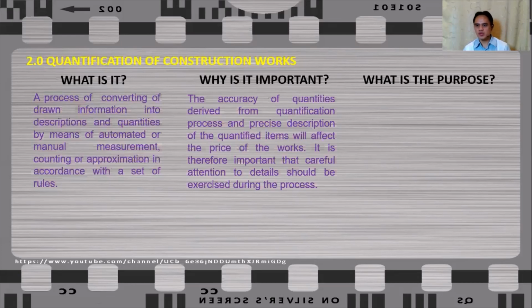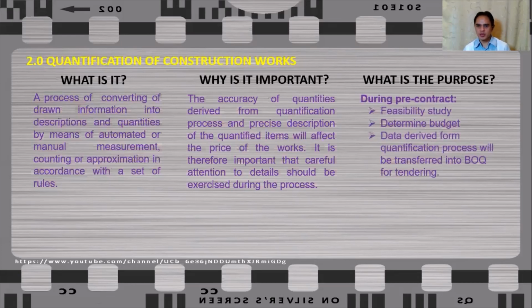And what is the purpose of quantification? Why you need to carry it out? During the pre-contract, the result of quantification process can be used for feasibility study. Also, it can be used for determining the budget. And the data derived from quantification process will be transferred into a bill of quantities that will be used for tendering.